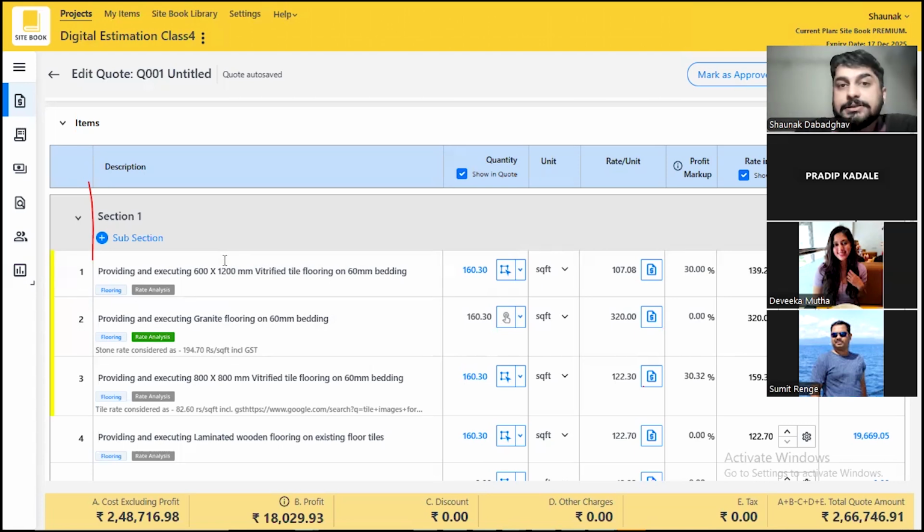Yeah, so what our earlier company used to do, I've learned it from there only, is that you can add it as a provisional cost. That provisional cost is something where for that particular item, maybe you don't know the exact cost. So it is not overhead, okay? It is an item which has to be executed. It is not within the existing items. It is a different item. So anything similar to that can be put in a different section called provisional cost. You're just making a provision and you think that that would be an approximate cost. And if the client has to execute it, then you will give a very accurate cost of it. So this is when the spec is not well defined for that item.